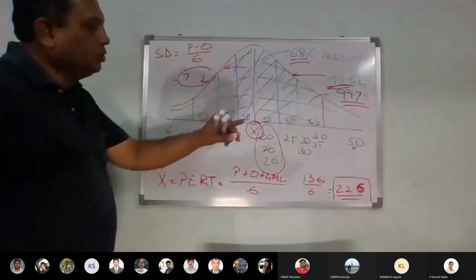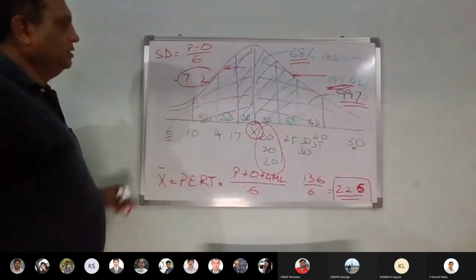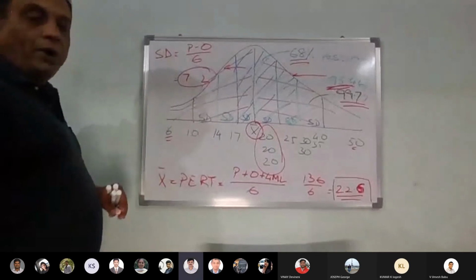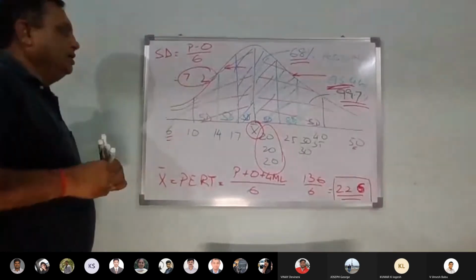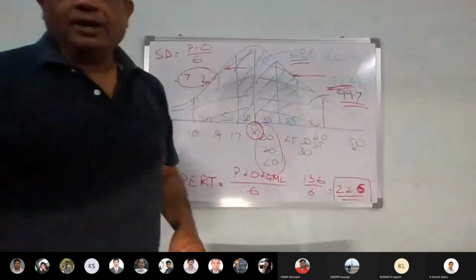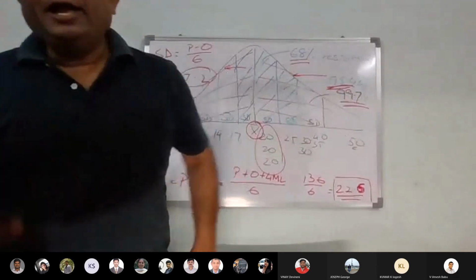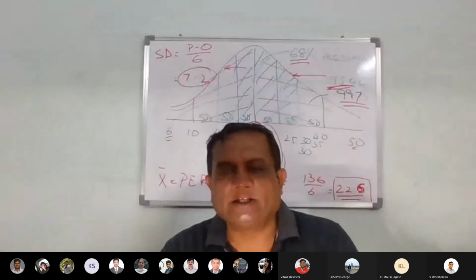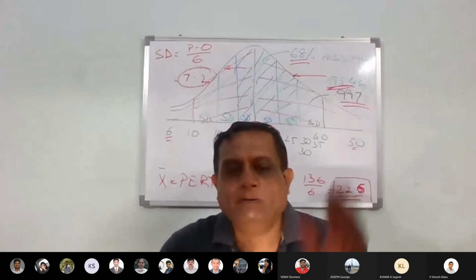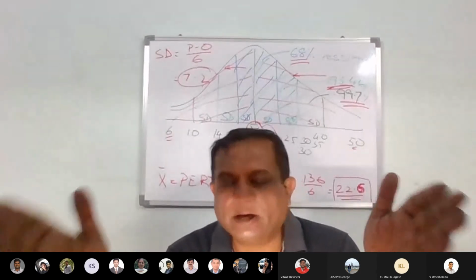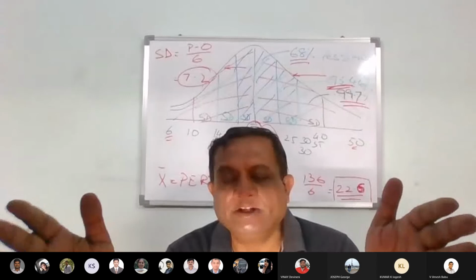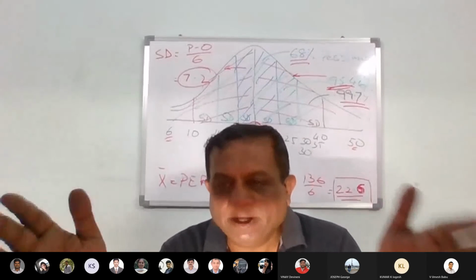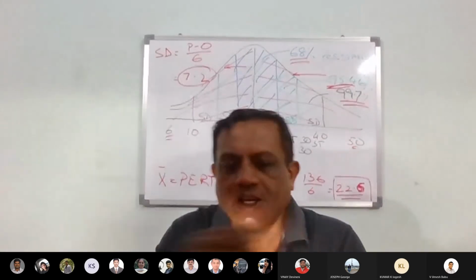It will be done in 22.6 plus minus 21.3 hours. Okay, so I can then manage the expectation of my customer much better when I give them this range rather than something very, very accurate, which is scientifically incorrect. Okay.